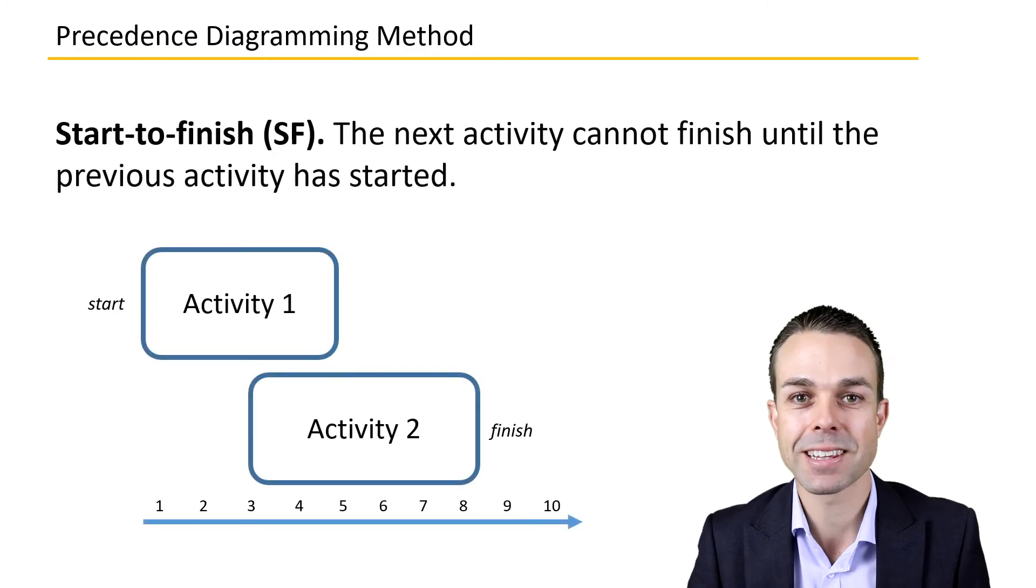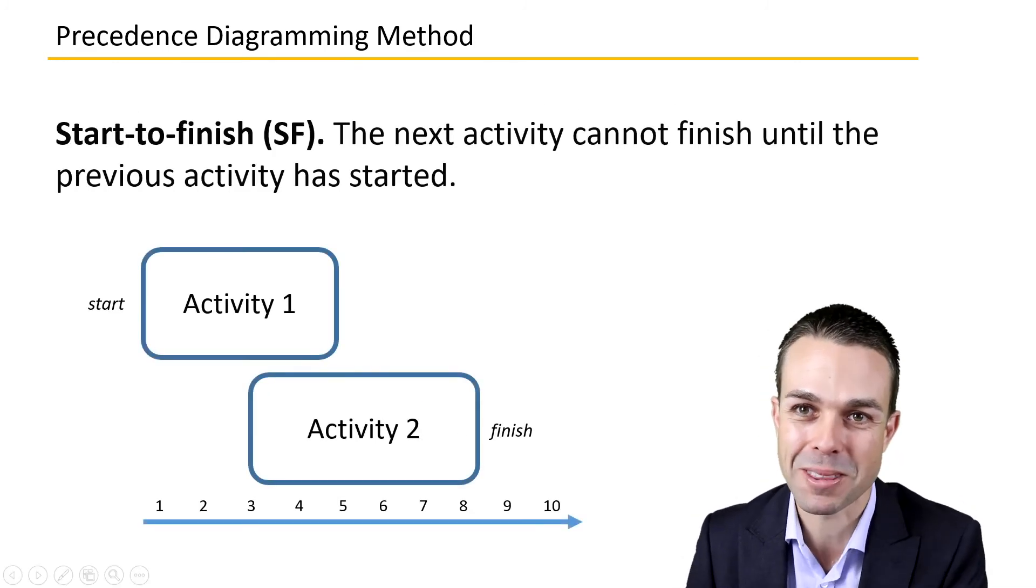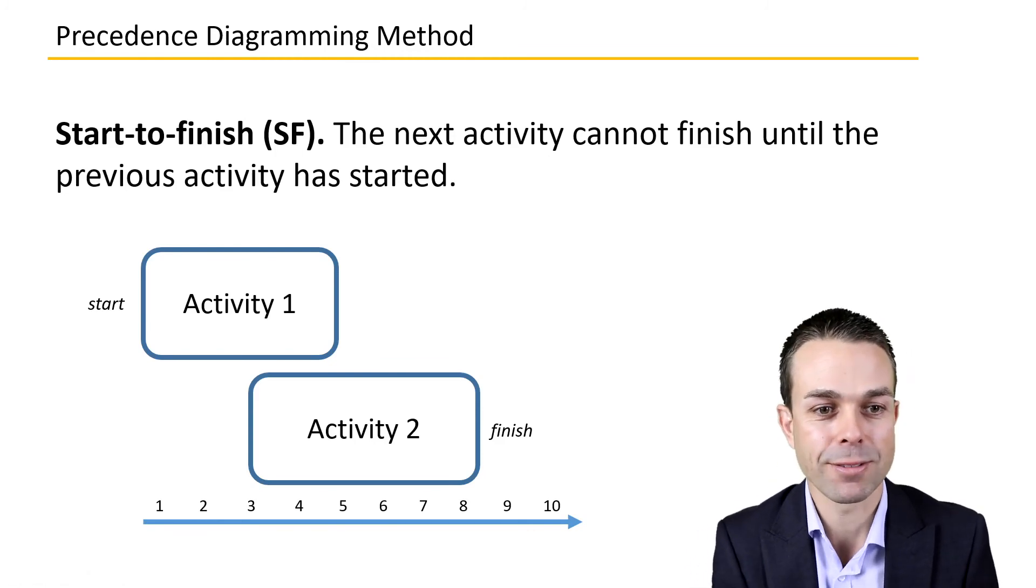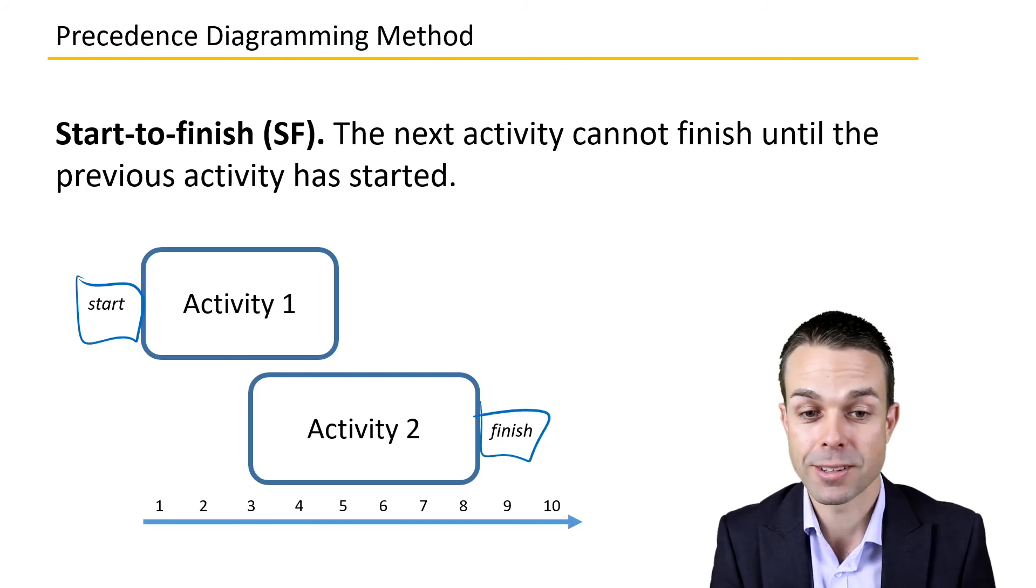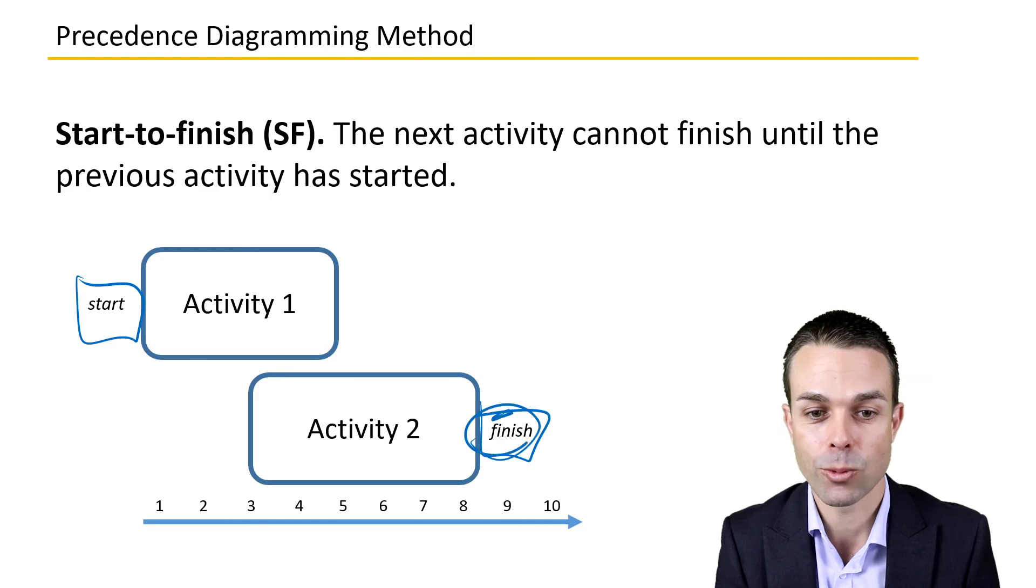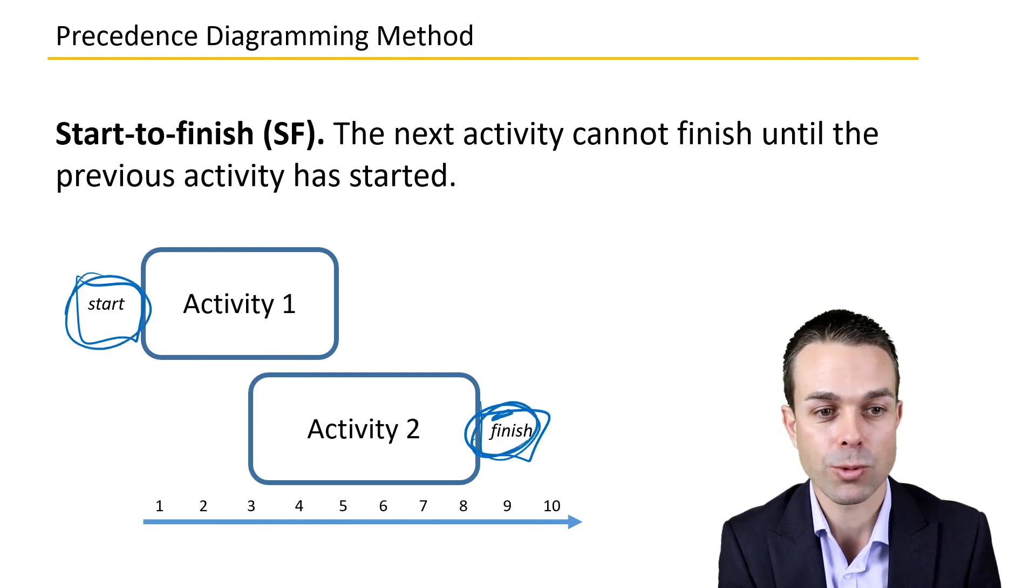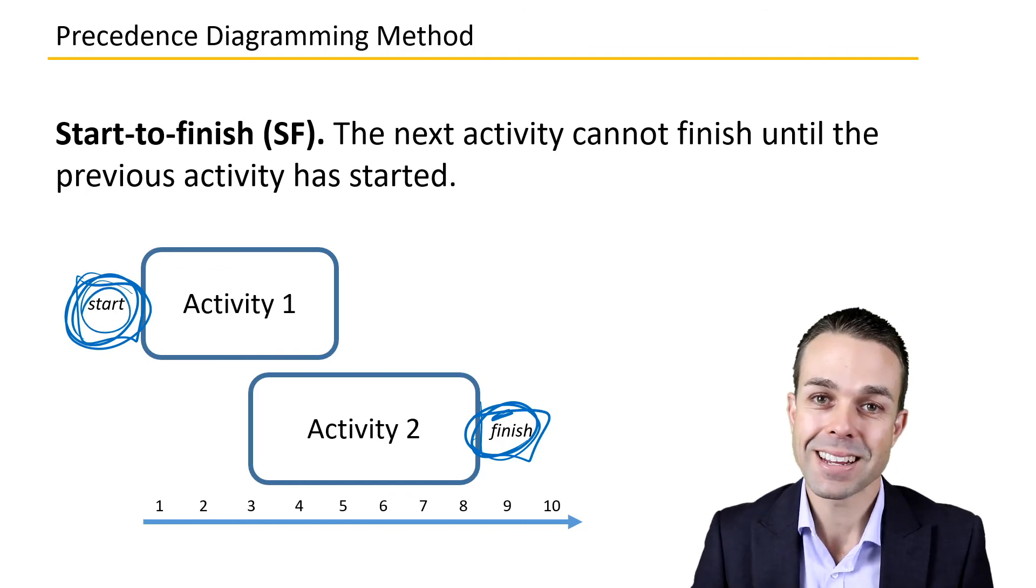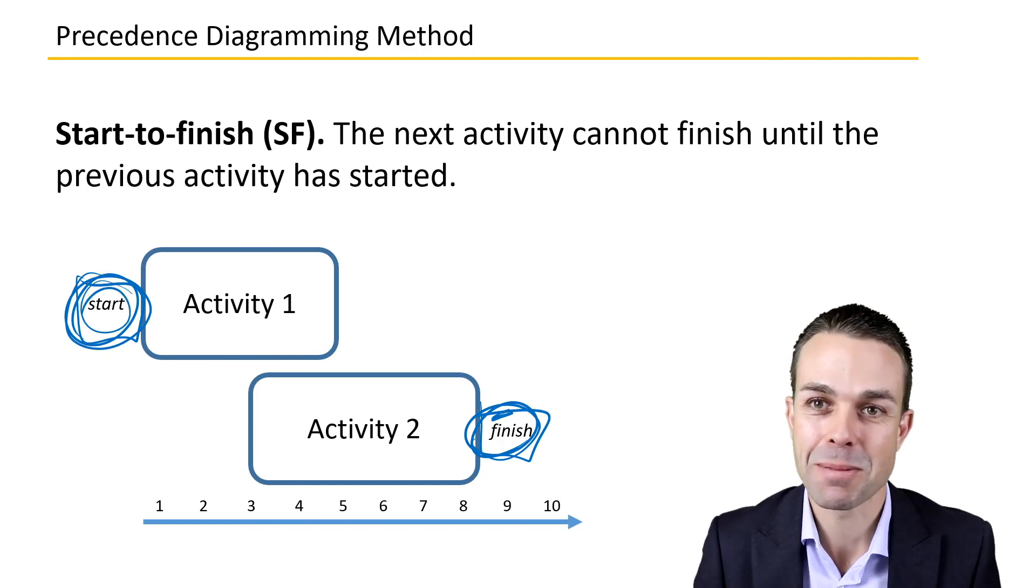Lastly, we have start-to-finish. Can you guess what this one will be? The next activity cannot finish until the previous activity has started. So the second activity cannot finish until the first one has started—it's dependent on the first one starting. And that is the idea behind the Precedence Diagramming Method.